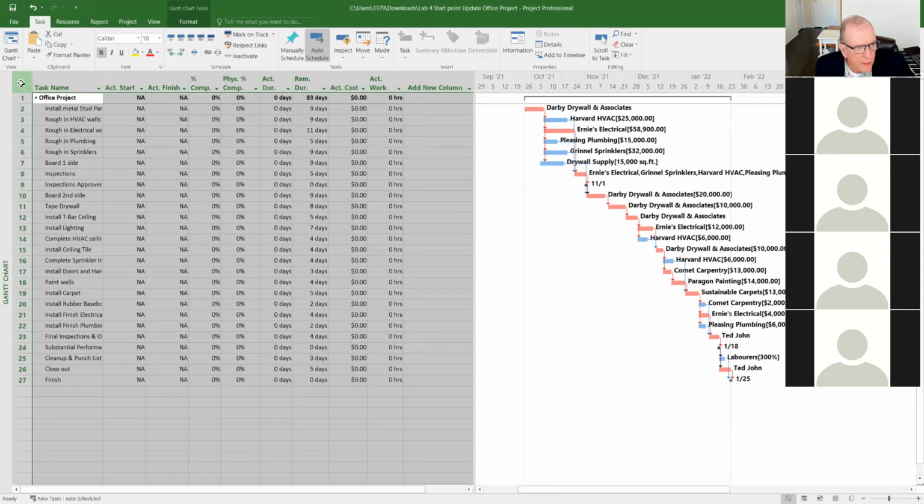So you select everything and then you simply click mark on track and it should update everything to the left of the status date that you have not already updated. Oh, okay, that's it. Thank you, sir. No problem. That's a quick way, once you've updated everything with actual starts and actual finishes and you've got some stuff left but you're happy where it's at: select all, mark on track. But don't do that ever first. Do that after you've updated all the unique ones like we just did.